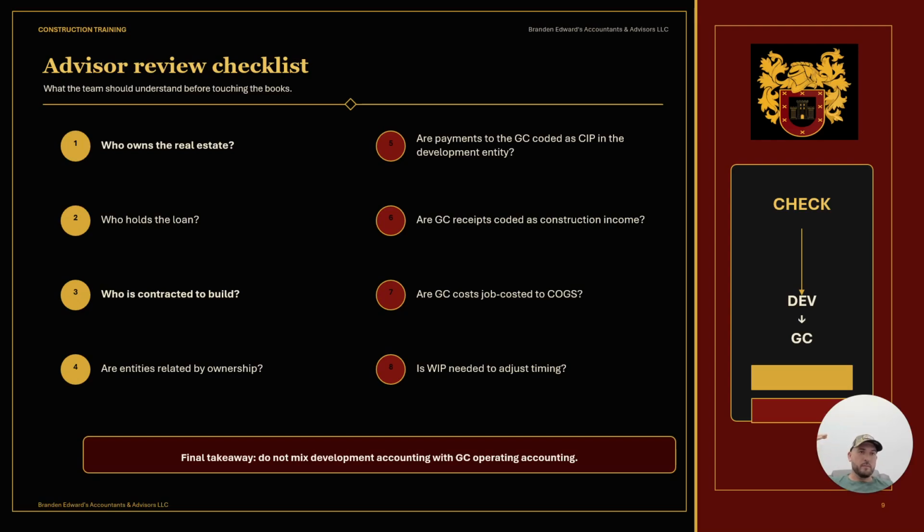Once a job is finally closed out, the estimate is going to be tied out to the actual construction cost at the end, and with that WIP adjustment, you'll see that profit and loss from that job will carry straight over into the profit and loss report with that adjustment. There's a whole bunch of math there. I don't want anyone watching this video right now to get too crazy on it, but if you have any questions, that's great, and they'll likely be answered in the work in progress adjustment video.